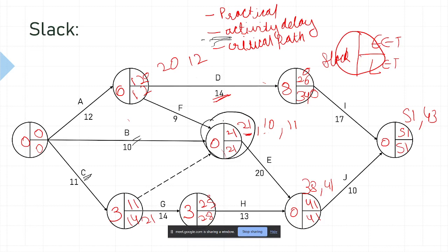So now you see that even if the Slack is 0, it is not showing us which activity we can delay or cannot delay, right? There is some missing point here. Do you get what I'm pointing towards? Yes, sir, we agree. I suppose that is the drawback of the AoA network? Okay, drawback of AoA network.